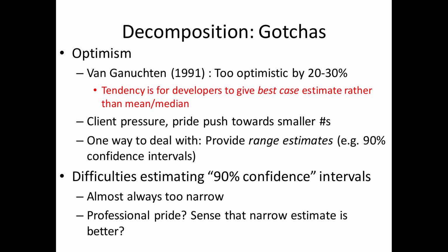And one way to deal with this is range estimates. So you force a discussion of your uncertainty. And you can come up with these. The problem is that when we come up with range estimates, our estimates are almost always too wide. Begins with an N, ends with a W. There's two R's in the middle. Yeah, narrow. Thank you. Narrow.